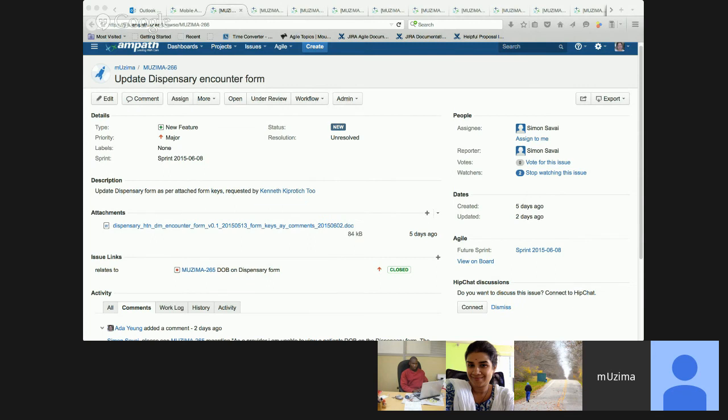I think this is actually a good time to discuss how we deal with developing the encounter form. I think we need to be consistent, or firm, in a way that anything provided after the development start date needs to go through a different ticket, because my worry is that it's never ending.